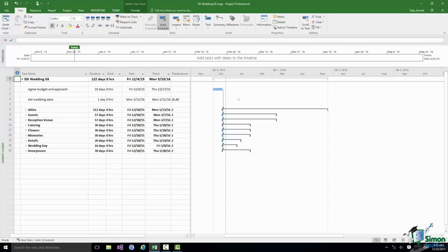They can also be used to show you what's coming up next, what's happening say over the next week or the next month or the next few days. And very often milestones are associated with a payment schedule of some sort. So for example, when a particular point is reached in a project, there may be a payment to make.